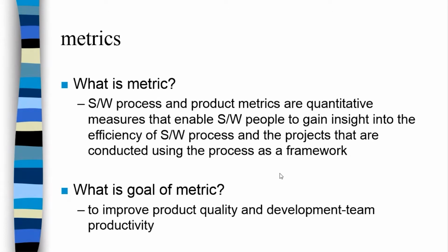So this basic quality and productivity data are collected, and then analyzed and compared against your past averages. If you are developing a similar kind of project to one which you have already developed earlier, now with some kind of enhancement, you can analyze the quality and productivity data collected for that previous project and compare it with your current project's data.